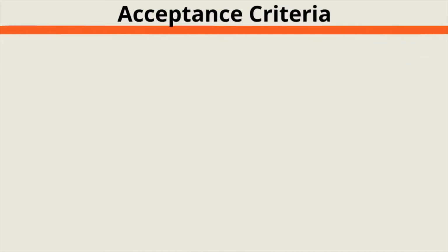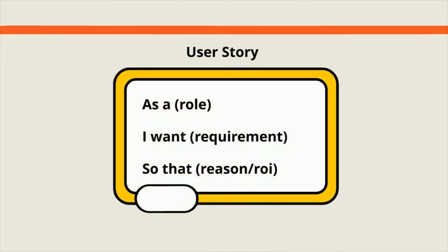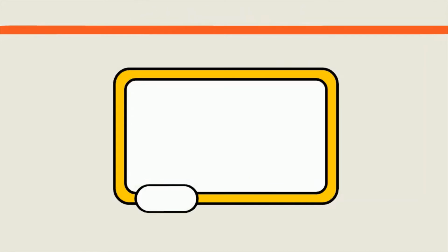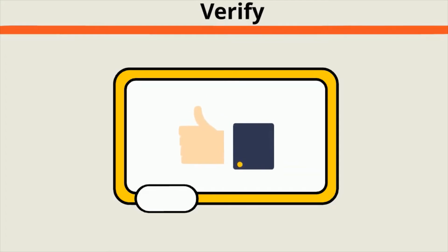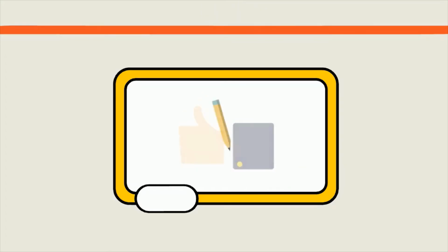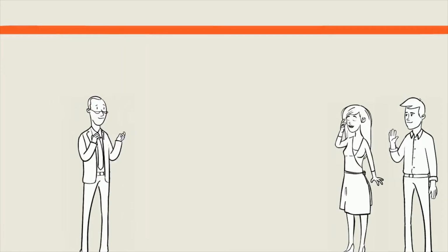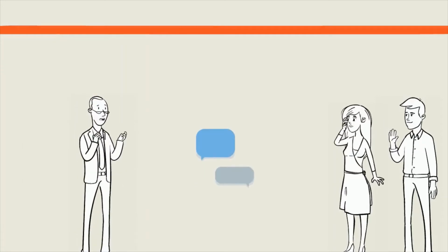Acceptance criteria. The purpose of this is to articulate precisely on the user story from the product owner's perspective. This actually translates to acceptance test. Usually a quality assurance tester can be used to verify the quality of the feature. A tester should be involved in writing it, but it is the product owner's responsibility to produce them. Agile business analysts are helpful in assisting product owner and extracting the right information for user story.